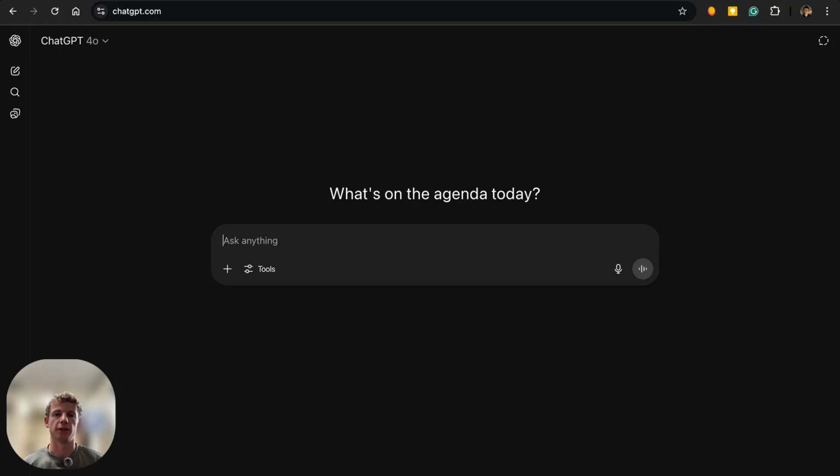Now, before we kick it off into the demo, I'll give you the 5 key steps that you should follow to write your next RFI. Number 1 is to make sure you start with a proper, detailed prompt. Number 2, feed it good examples of at least 2 of your best RFIs to give it guidance on how it should sound. 3, give it the right spec and the drawing so it has all the context it needs to fill in the gaps.